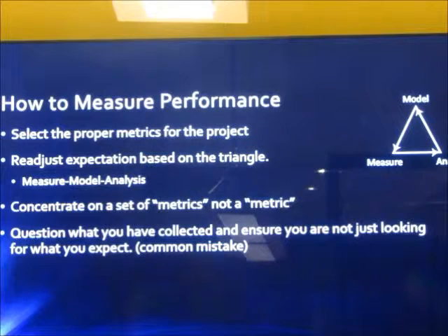If I was to say that I've got a number of URLs per second that I can service as a metric, and I need to hit 87,000 URLs per second to be able to do a specific project, to hit a specific scaling point so that I can service this one customer, I can scale that down to one machine. I know what I have to do on one machine, and then I know how many machines I'll need to do the project. If I don't have that proper metric, if I don't know what my goal is, I don't know when I'm done. I could have been done 2 months ago, right? But I'm still working on the project because I'm getting that last little feature, okay?